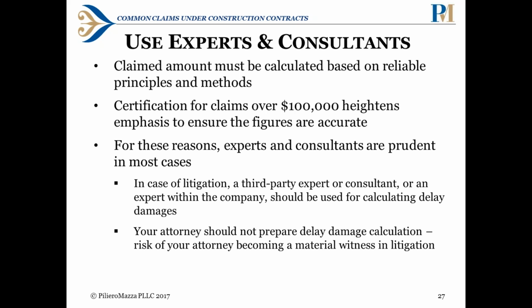I'd also note that experts can be useful for, for example, differing site conditions, for defective specifications, for explaining what the actual normal situation for the location is. So it's not just the cost, but also the legal basis of the claims.